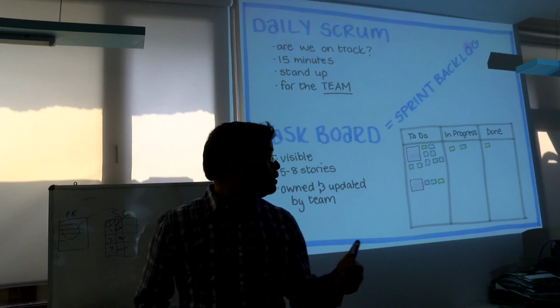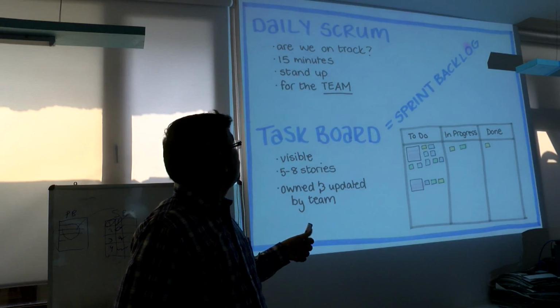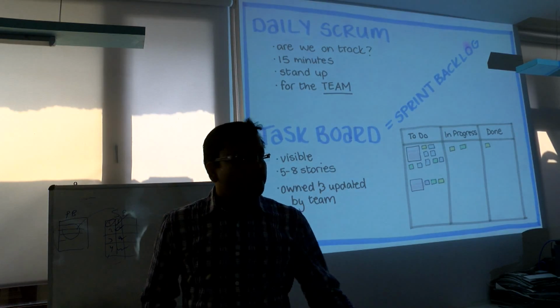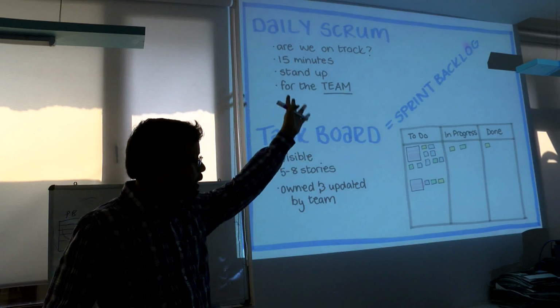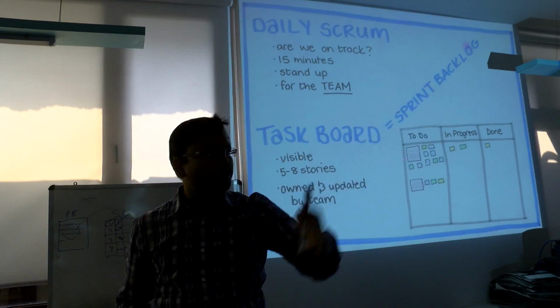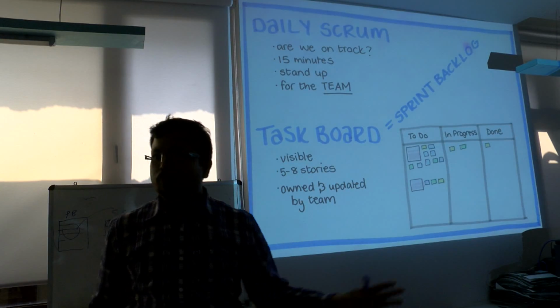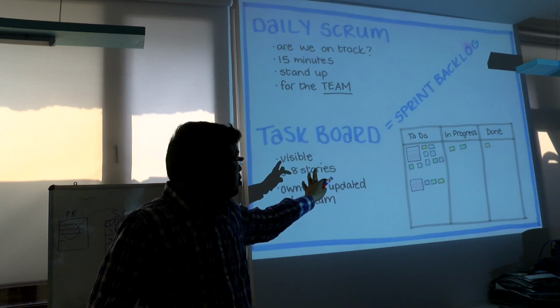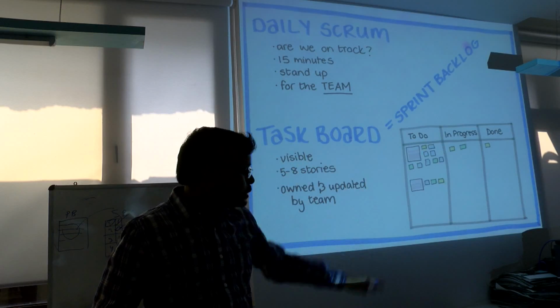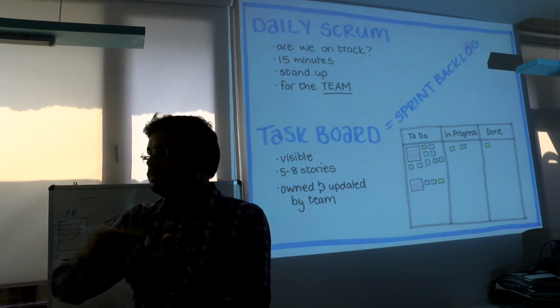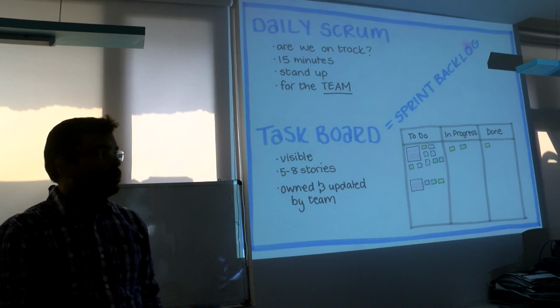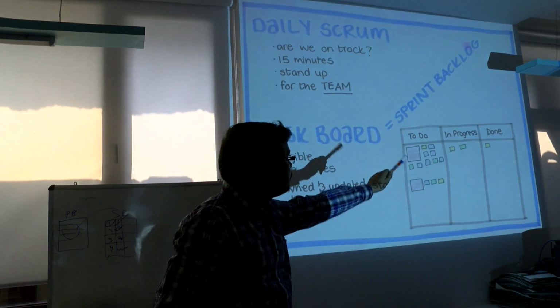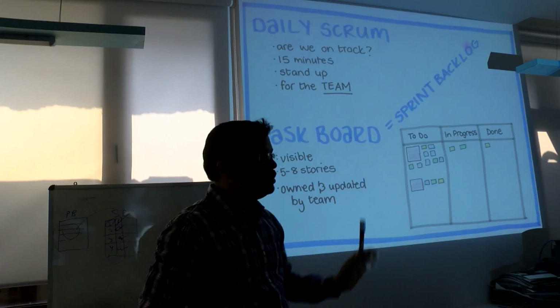One thing. Second thing, daily Scrum finish. Now, second thing in the daily Scrum, there is a task board. Like there is a whiteboard. I am planning to bring one to the Vertex. I hope so. I am not sure, but I am planning. There is a task board, and on that task board, there is a flip paper, just to paste on the top. So create 3 types of things: to do, in progress and done.